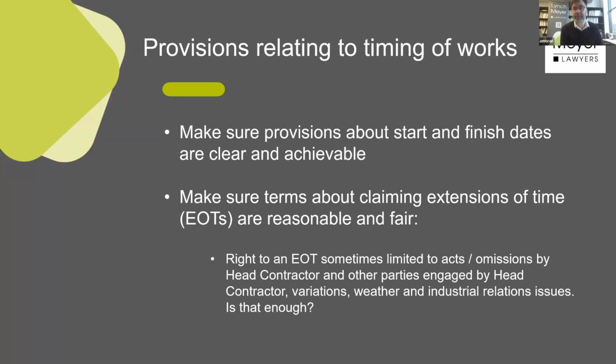Industrial relations issues, broadly, are seen as covering it if there's some sort of statewide strike, if the CFMEU or some other union does some sort of statewide, countrywide thing, you get an extension of time for that. Obviously not a common occurrence. Normally site-specific industrial issues don't get extensions. Now, that's sort of the bedrock, what you'll normally get. That's normally what you get if a contract is lobbed over to you and they say, sign this, I want you to fabricate this, weld that.